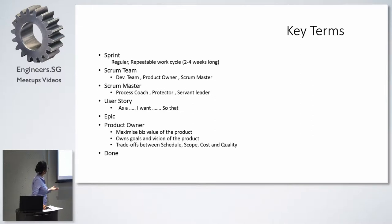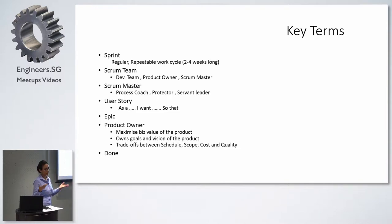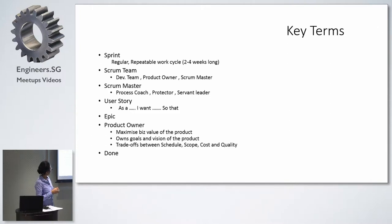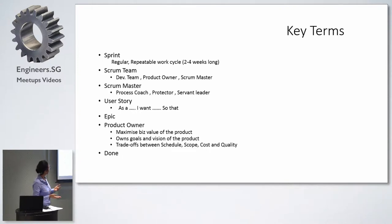So first of all, sprint. In the normal waterfall methodology, we have something called releases, which we do after like three months or six months, depending upon whatever suits us. In Scrum, we call it a sprint. The difference is that we make smaller releases because we want to deliver customer value often and fast. Typically a sprint is two to four weeks long, though I have seen some sprints one week long also.